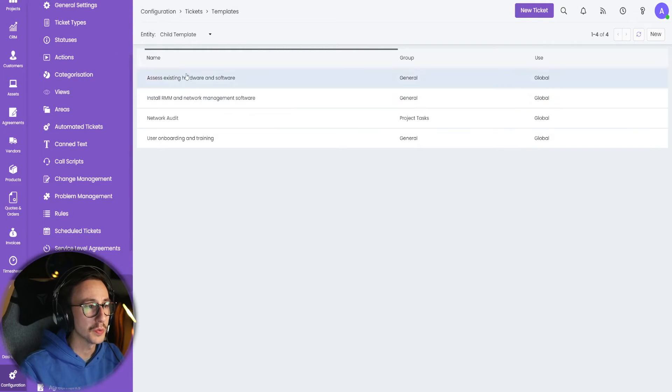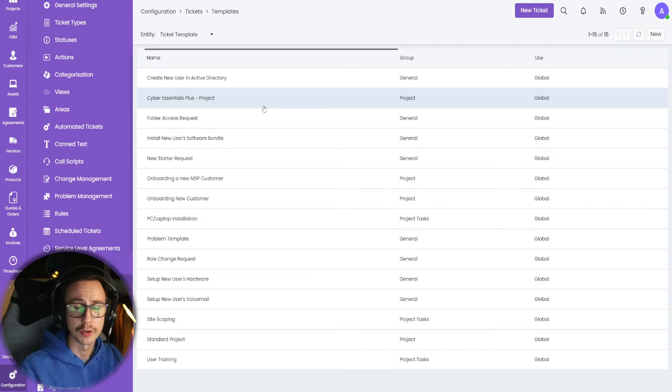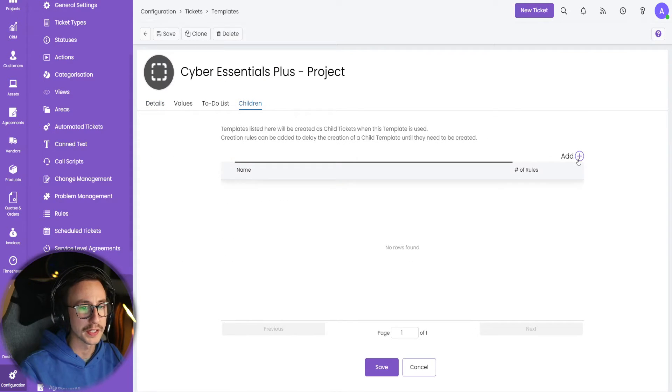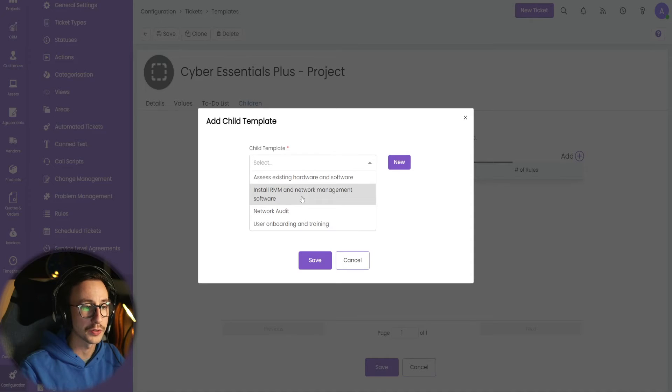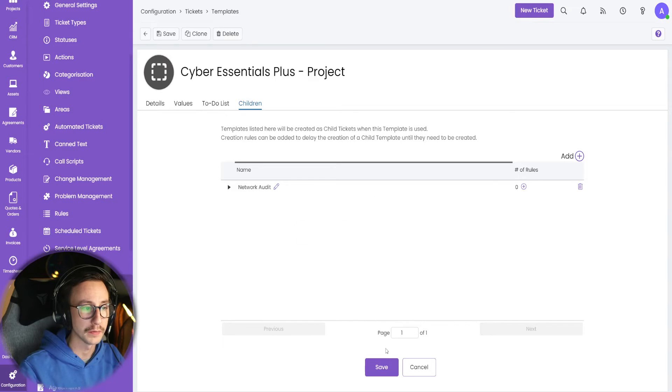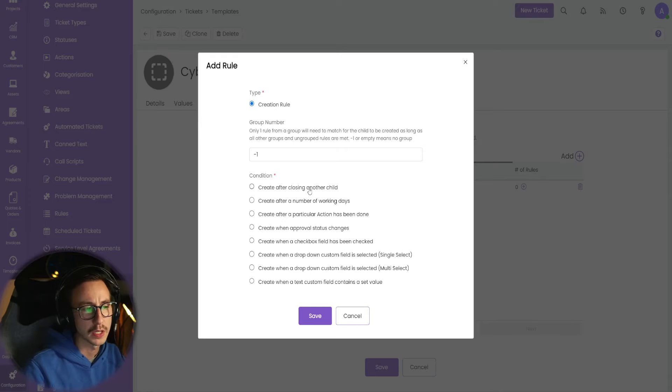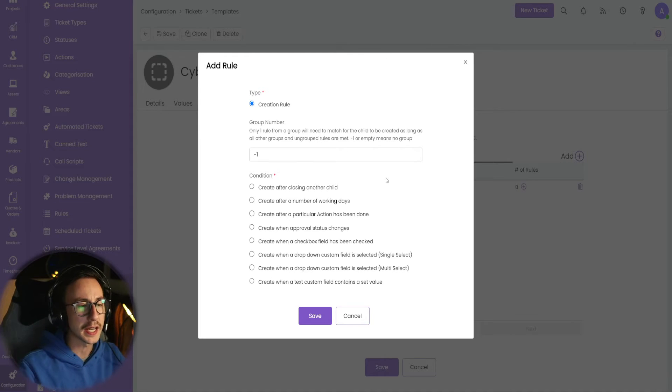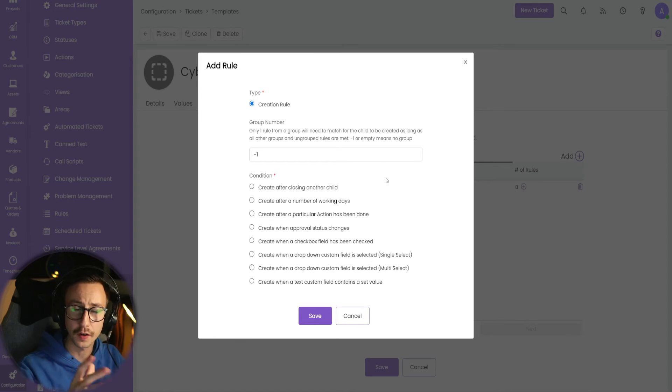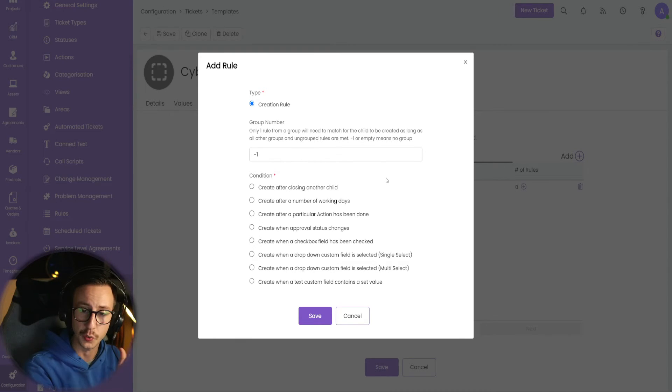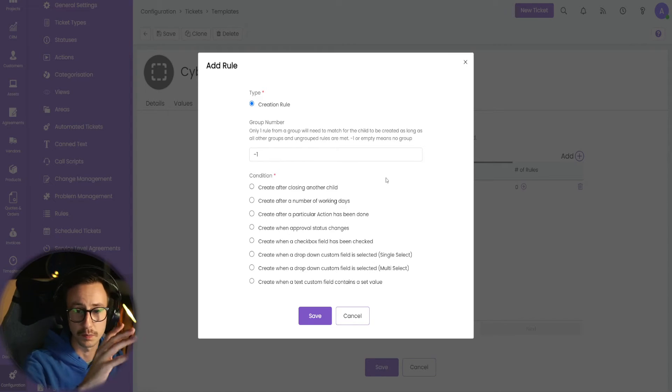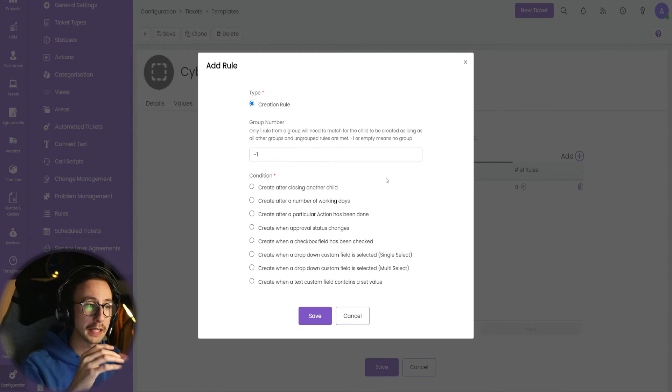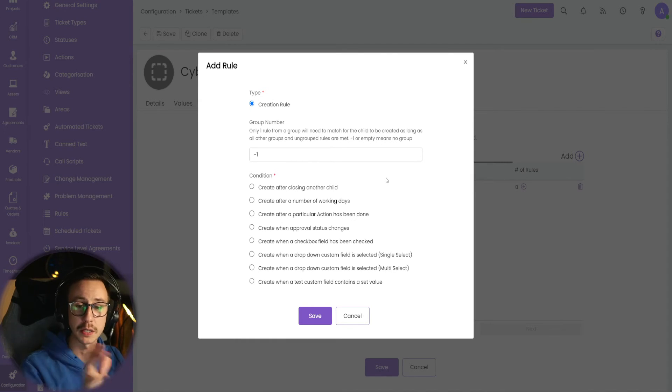Then what we can do in our ticket template or route template, if you will, is go to the project, go to children, and we could now add in that child template of network audit. And we can add rules to this. So we can say, only create this child thing after something happens. So say, if you had a three-step workflow, the first thing you had to do is install all this equipment. Then you had to run a scan, and then you had to get the report. You could actually make these as three separate child tasks to drive your workflow and drive your team into doing that.